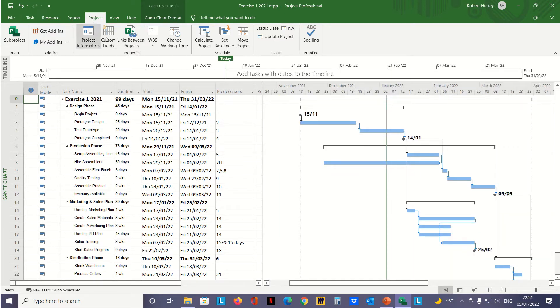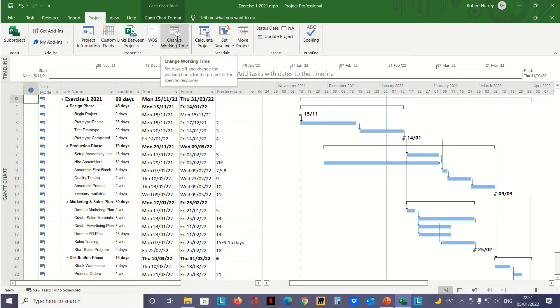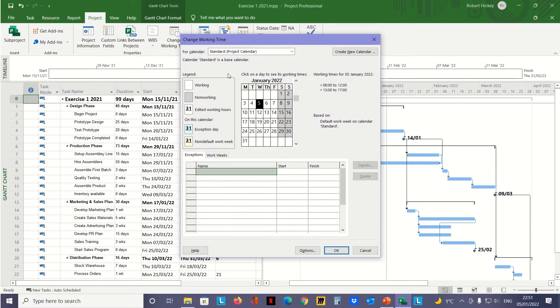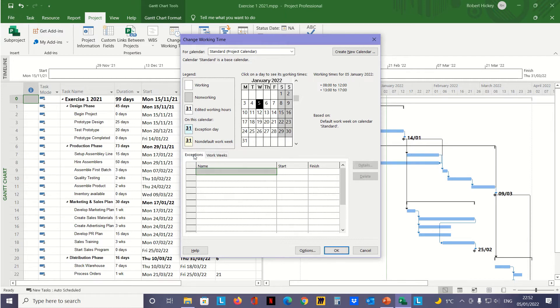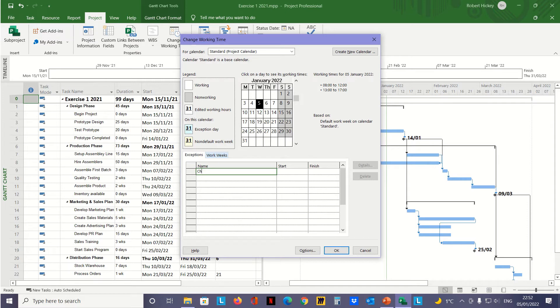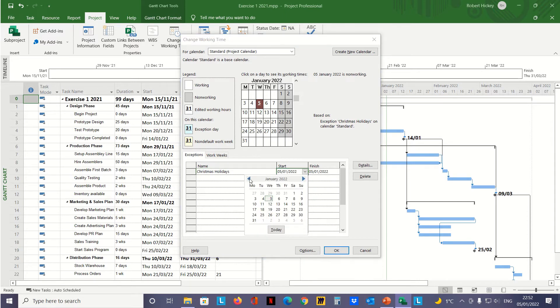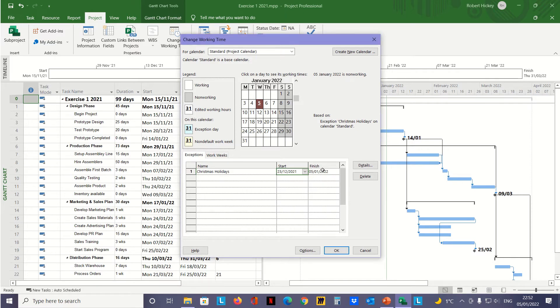I go back up to the Project tab in the Properties group and click Change Working Time. At the bottom of this dialog box, we have two tabs: Exceptions and Work Weeks. First, on Exceptions, we'll select the cell underneath Name and type in Christmas holidays. Then in the next column under Start, we click the dropdown to select the date from the calendar—we'll go with the 23rd of December.